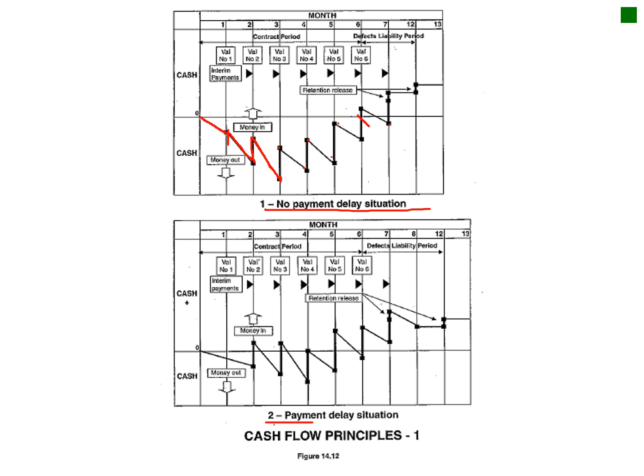But if you can negotiate with your suppliers and subcontractors that you pay them only later on, you can see how this trend of cash outflow is alleviated, so that it doesn't go down as sharply as it did here in normal circumstances. After the first month you're actually getting a bit of a positive cash flow, and then you dip back, and overall your cash flow deficit is much less.